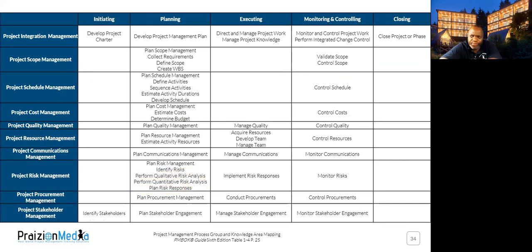Another big thing that we did was procurement. So there were not too many procurements, but there were some. We actually did consult with an agency. There's an agency that sent a representative to us as a project coordinator. So look at this as staff augmentation. She would come in for a few hours here and there, and she would do a few hours a week. And we had a contract. We had a not to exceed, though, every week. So she would come in, support the project the best she could, and help the project manager, Esther. And Esther was really happy about that.